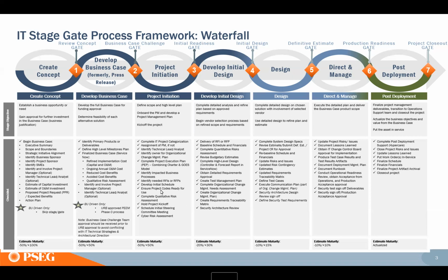So as you finish up all of these, you're like, okay, I'm ready to hit my next gate. And I'm going to talk a little bit about how do you go through gate reviews before you go to the next stage to get the approval. But for now, just understand there's a gate. It's really a stopping point where you do those checks, and then you'll get approval from your steering committee as well as the PMO. Hey, I'm ready to move to the next stage.